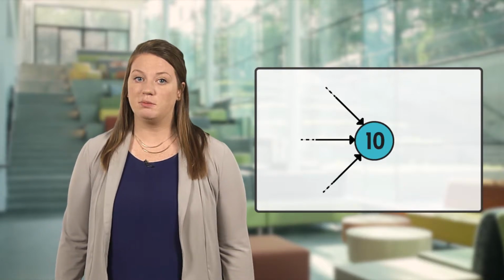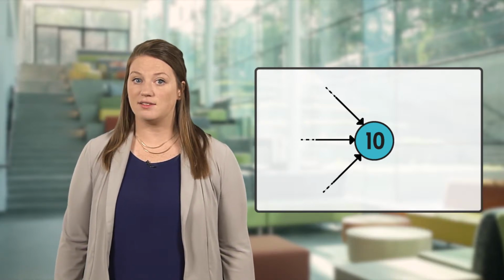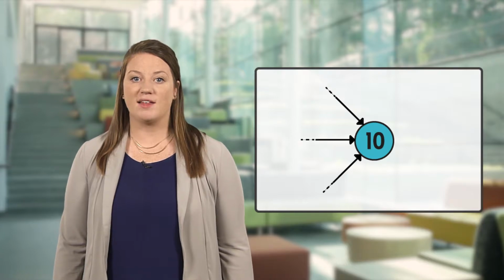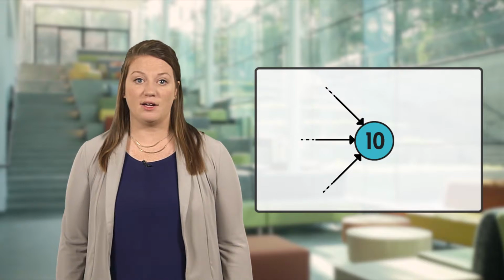Alternatively, when there are multiple paths leading into a node, that indicates that the paths need to synchronize. This means that all the paths need to be completed before you can move on to the path or paths leading out of that node.